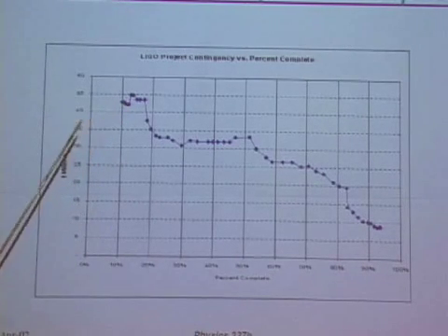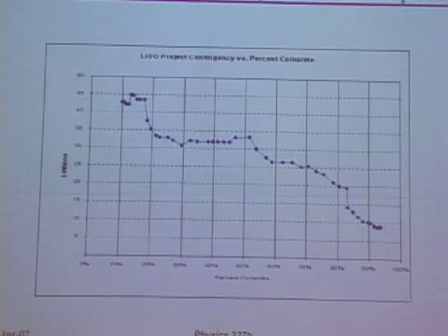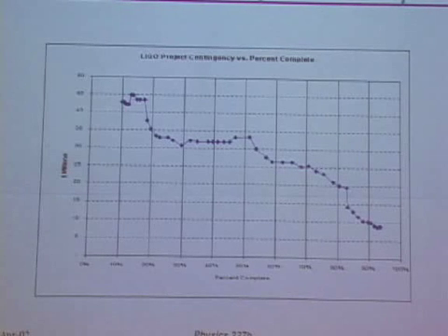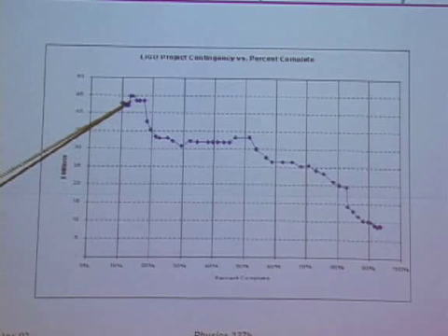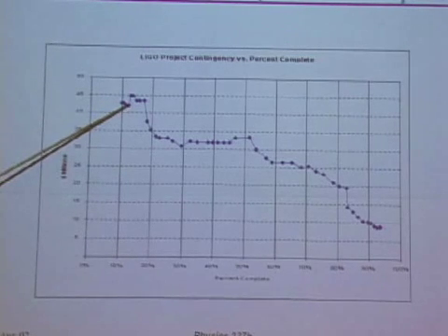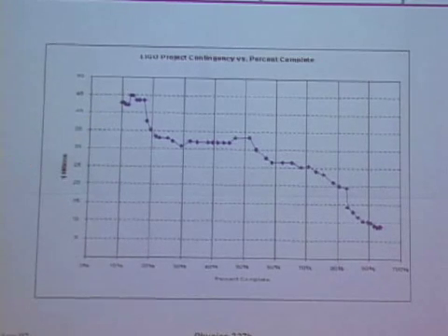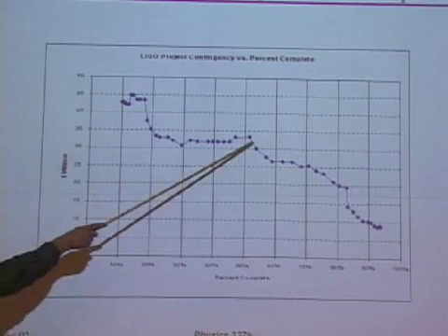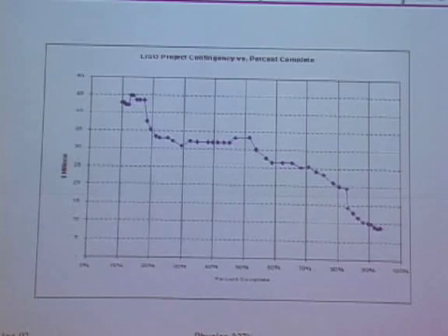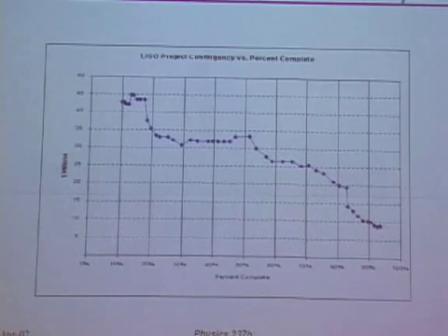How do we do that? We took some things out of the project, like I said right at the beginning, fancy rugs or the size of a building. We decided we wanted a little more safety, things that we could add later. It doesn't look like much on this plot, but it's $3 million. So we added $3 million in contingency at the beginning, and at various points along the way we did a similar thing. We built up the contingency by deciding not to do something.